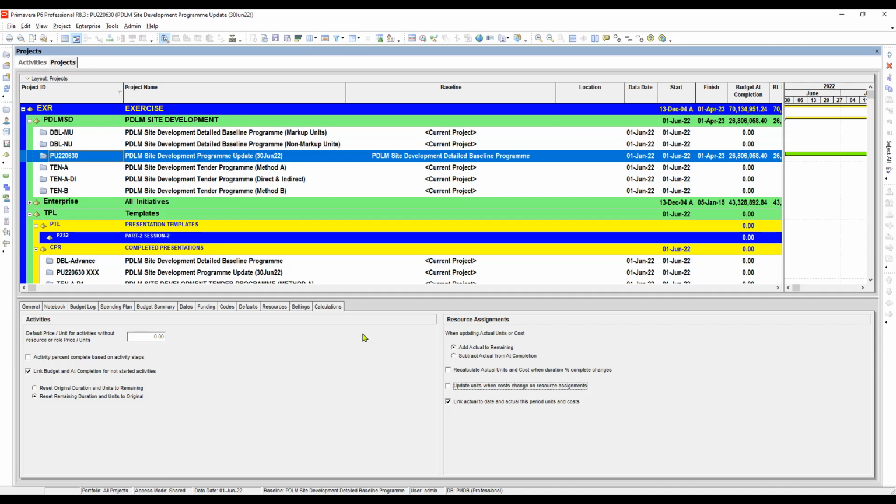The purpose of this one is that later on we will encounter what we call storing of past period performance, where, when we check this one, we only have to input this period performance. What is meant by this period performance? That is only a period. We are talking just about a period, let's say, for example, a 1 month interval. So for the period of June, for the period of July, the values are intended only for a specific period of time.